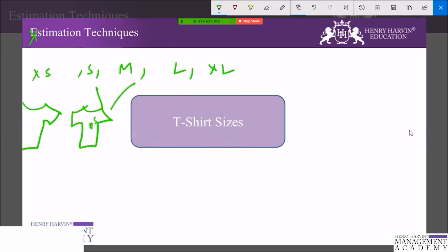So this is a perfect technique to give a rough estimate to a large backlog of items, and it is useful when a quick and rough estimation needs to be done. Later these sizes can be converted into numbers as per the requirement. The relative size, mostly medium, is decided after mutual discussion and agreement of the team members or the estimators. Then numbers are assigned to the items according to the relative size that is assigned to the medium size.